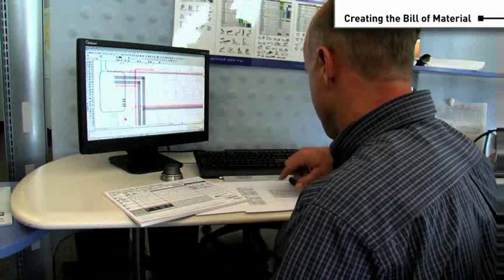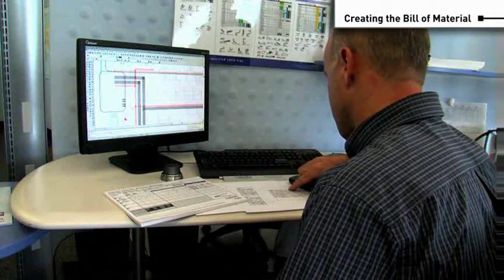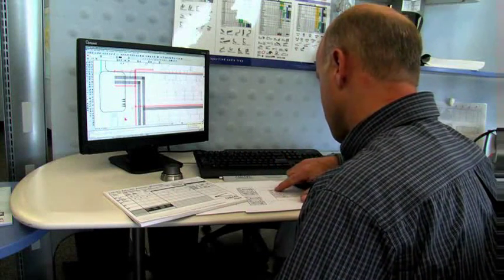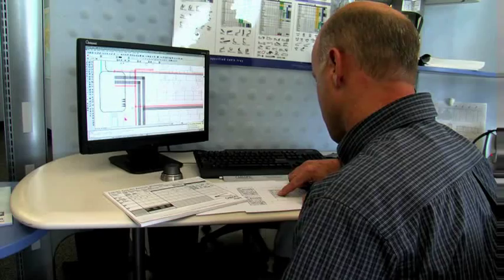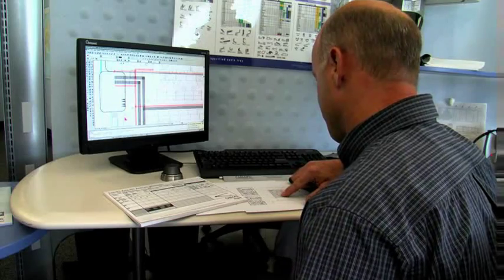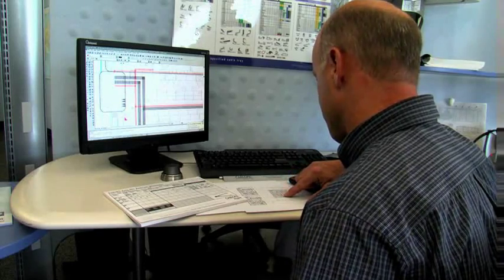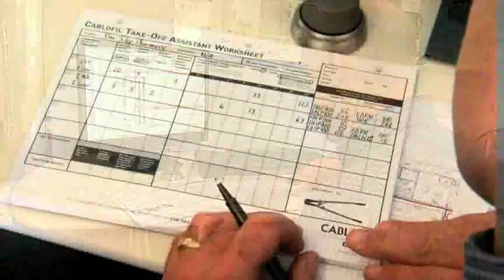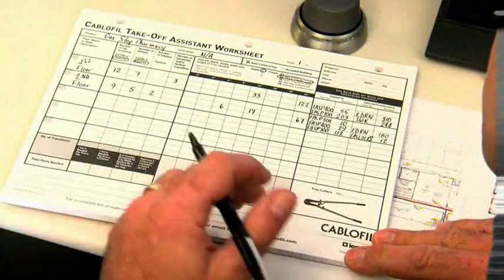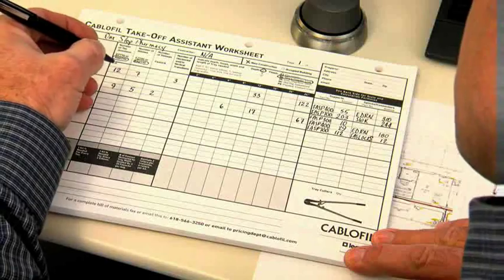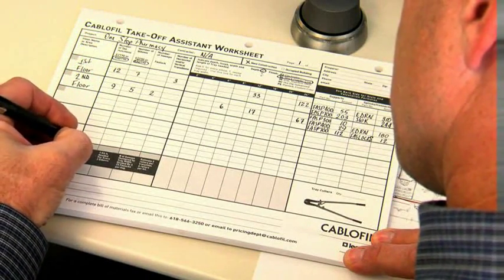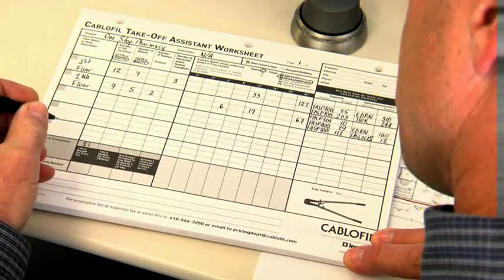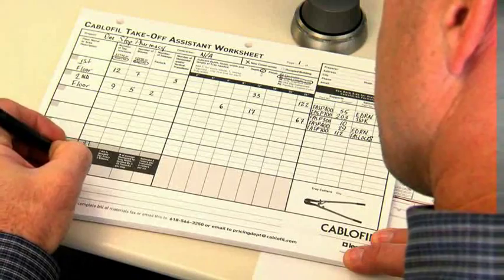For printed plans, use the Cablofill Takeoff Assistant Worksheet. This form will help you calculate all tray sizes and total footage of tray needed. It will also calculate the number of splices and supports you will need. To begin, enter the number of T's, elbows and other transitions.